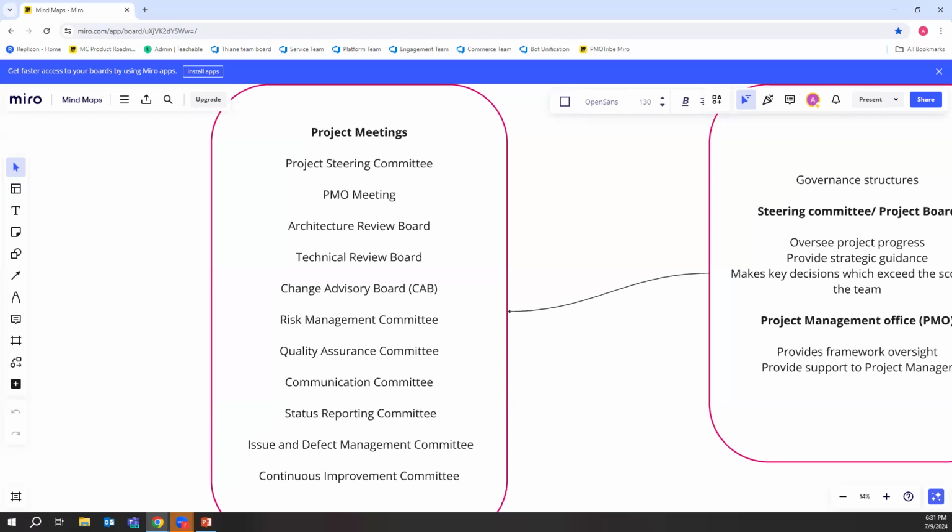Okay. Then we have an architecture review board. A lot of you might not have this if you're not in the IT space or in the construction space, but generally this is where the architectural community approves the project plans and designs. And if anything needs to change, we generally have a 2-week session with the architects, and we just validate where we are, if we're still on the right track, if we need advice, if we need to change anything, how do we go about that?